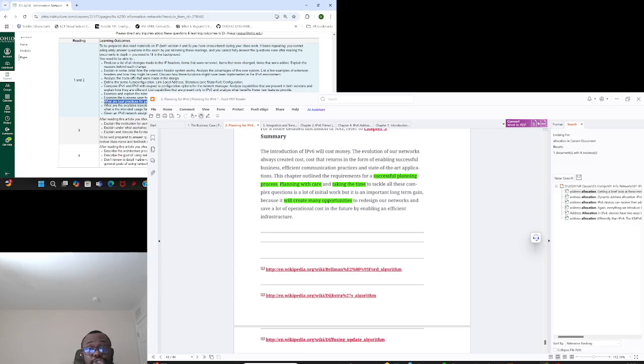With all this, you then refine your high level design, because it will influence how you should go about your high level. So after you refine your high level, you now want to go into your low level design. In your low level design, you'll mostly be talking about how you're going to do your address schemes, what subnet chunks you'll be providing to each of your departments, and all that.